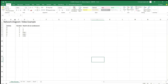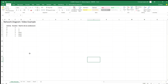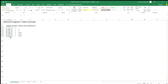Remember, I said when I started this in the slides, there are three sets of information you need before you can do the network diagram. The first one is you need to know the activities. In these examples we're going to pretend we know the activities, but in real life we need to figure that out. I'm just going to use generic activities — calling them A to F — not 'dig a hole' or 'build a wall' anymore. These represent the actual activities: that's the first set of information. Then you need the duration of all those activities. Again, in real life you figure that out. The third set of information is the sequence — how dependent the activities are on each other. I use the technique of asking: what predecessor do I need before I can do my activity?